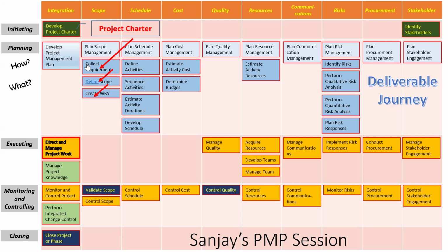The requirements will be used to put a border around it and then come up with the scope. One of the principles, Raj, is that when requirements are there, so many people will tell so many requirements. They don't all become part of the scope. Something out of that will become part of the scope, something might remain outside the scope, because that's where technology, constraints, budgetary things and all that come into the picture. So taking a set of requirements and deciding what is in scope and out of scope is called define scope. That's the next process. Define scope will create something called the project scope statement.